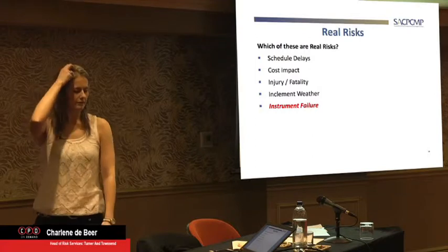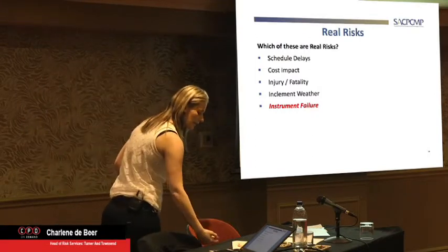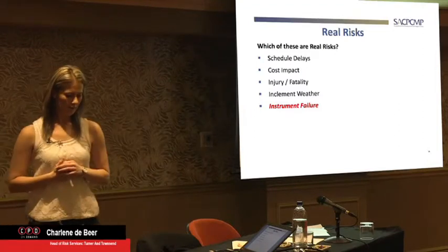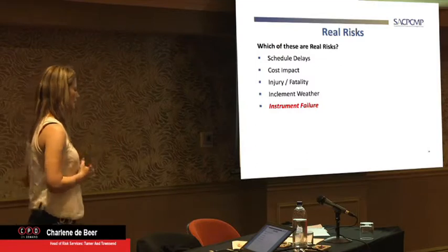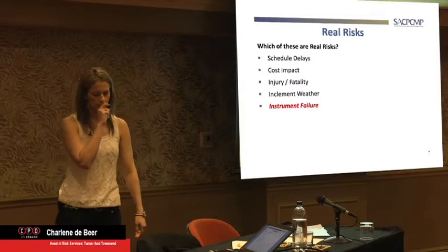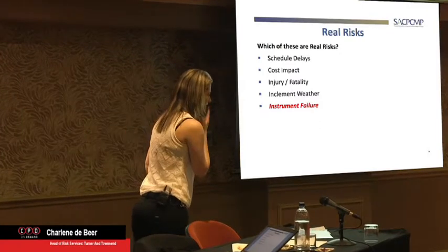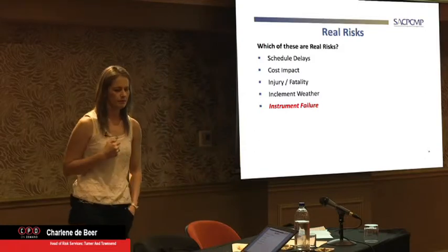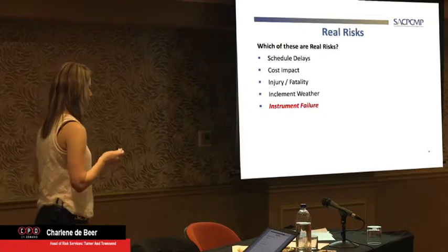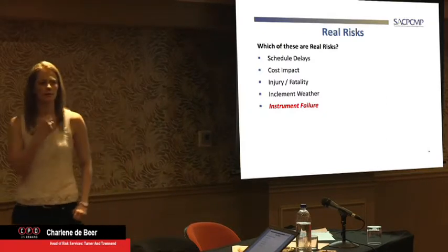And we can debate this. Really, we can, because it's very interesting. If my understanding is why you guys would think they were real risks, we can also discuss it and try and see if we can work through how we identify the real risks. The 4th one is a cause. So if I would say the risk is inclement weather, lots of rain, lots of wind, I'm not understanding what the risk is in inclement weather.